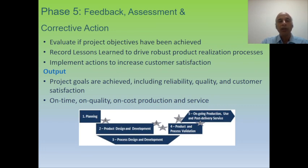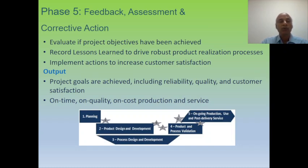Phase five is where we evaluate if project objectives and all KPI parameters have been achieved. We document lessons learned during the earlier phases, drive a robust production realization process, and implement actions to increase customer satisfaction. Outputs from this phase include achievement of project goals — covering reliability, quality, and customer satisfaction — as well as on-time delivery. All customer-related quality, cost, production, and delivery-related targets being achieved is the output of Phase five.